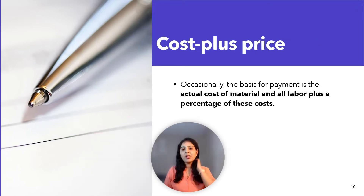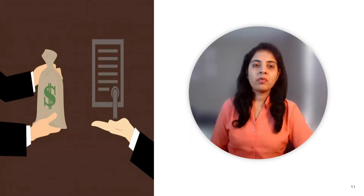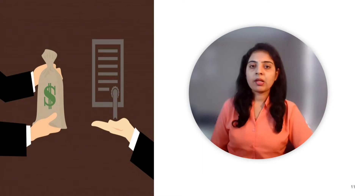Occasionally the basis for payment is the actual cost of material and all labor plus a percentage of this cost, termed as cost plus price. The estimator, from past experience and with the aid of cost data from previous similar jobs, determines the cost of preparing shop drawings and fabricating the structural steel.